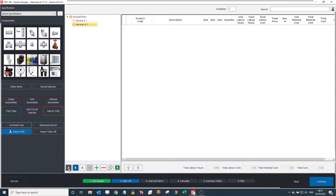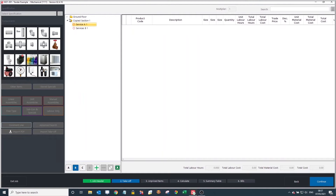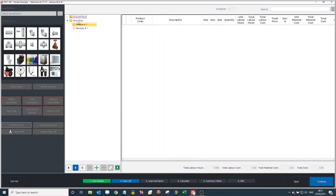If you need this structure for a couple of floors, you could create a First Floor section manually, or speed up the process by right-clicking on the folder and pressing Duplicate. That creates an identical copy, and all you have to do is rename it to 'First Floor'. One thing you can do to stop the structure from folding up all the time is to right-click on any blank white space and select 'Keep Globally Expanded', which stops it from constantly folding when you duplicate or create new folders.